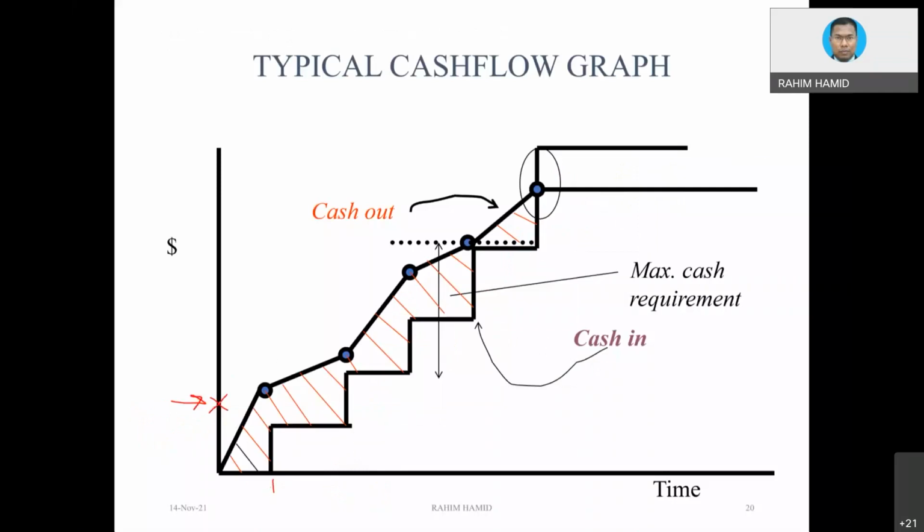That is the idea why advance payment was created, in order to ease the burden on the contractor's cash flow. But not in all scenarios. Only government projects would basically do that, whereas the private sector, sorry, they don't have those things.